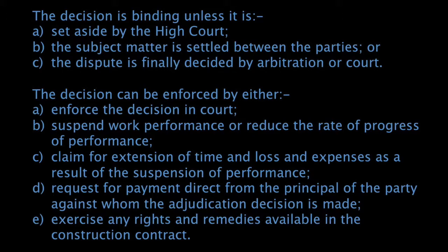In the event the decision is for the claimant, the respondent will be required to make payment. Failing which, the claimant can either enforce the decision in court, suspend work performance or reduce the rate of progress, claim for extension of time and expenses as a result of the suspension, request for payment direct from the principal of the party against whom the decision is made, and exercise any rights and remedies available in the construction contract.